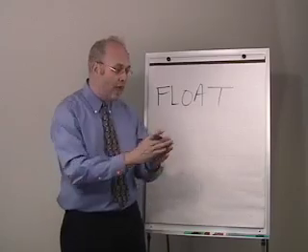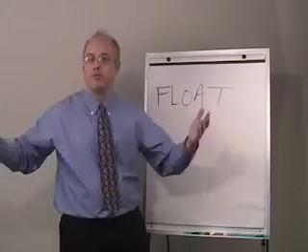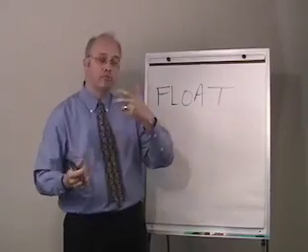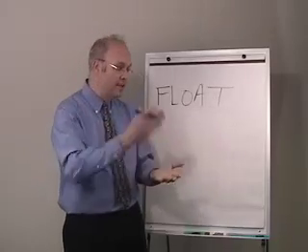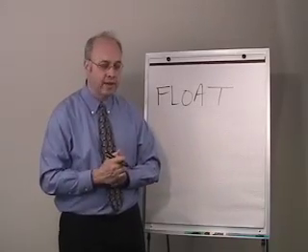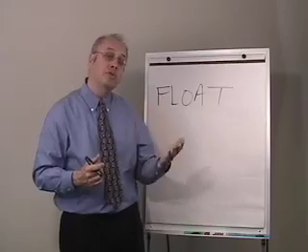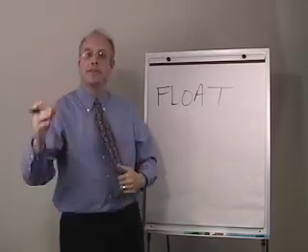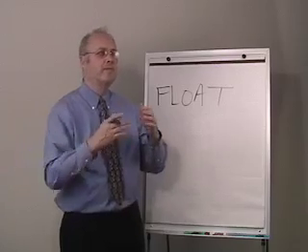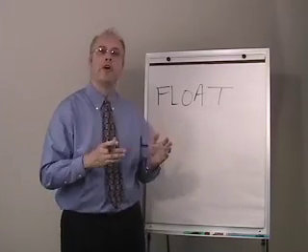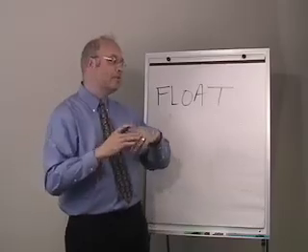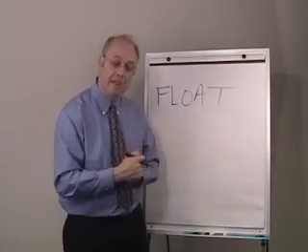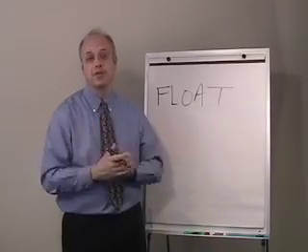Theoretically, if you have 10 piers worth of piles to drive, you could mobilize 10 pile driving rigs and drive all 10 piers at the same time. But you could also mobilize one pile driving rig and drive each pile successively. Well, if you had no float on pile driving, and in order to complete the project on time, you had to mobilize 10 pile driving rigs, then that's what you'd have to do.